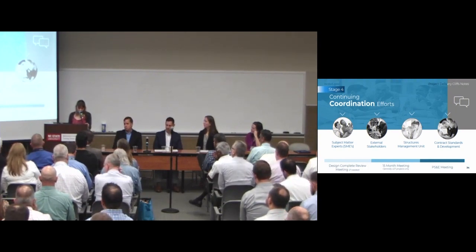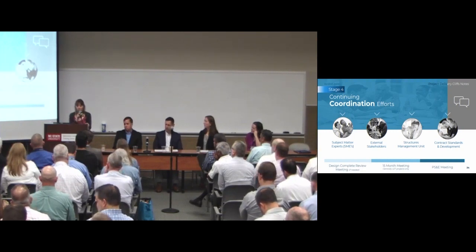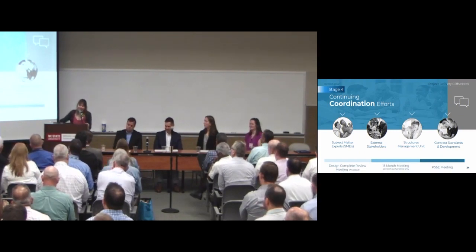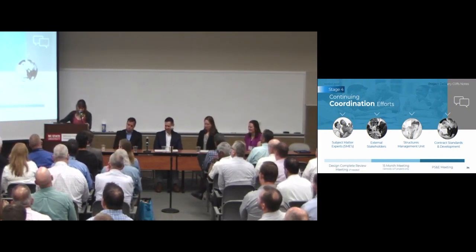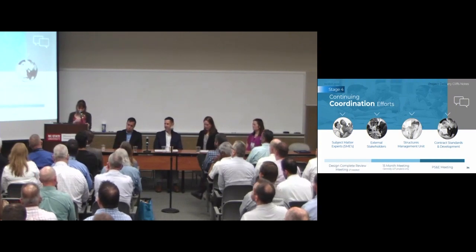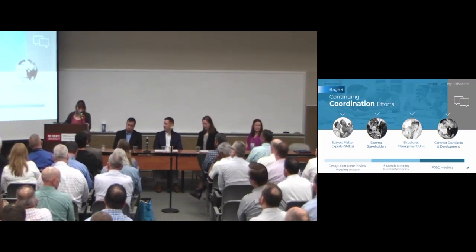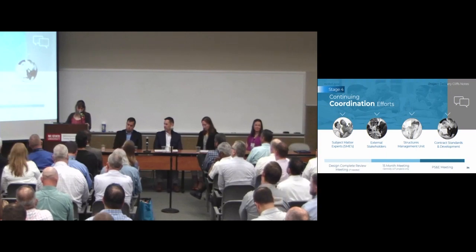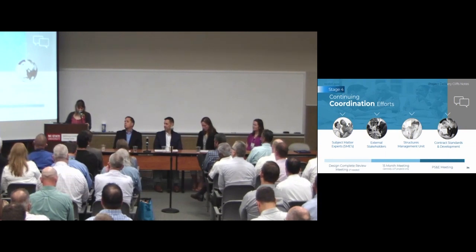For the 15-month meeting, this is new. I'm excited about a new meeting. This is for centrally let projects only. I'm sure we'll be hearing more about this meeting later as we know more about it, but the purpose of this meeting is to make sure we're ensuring projects are ready to be added to the 12-month let list. Project managers should be ready to discuss necessary deliverables to complete prior to PS&E and identify any risk and how they will be addressed or mitigated, sorry.